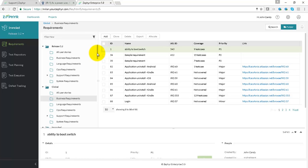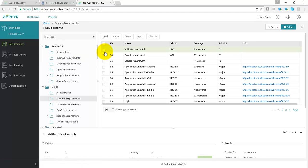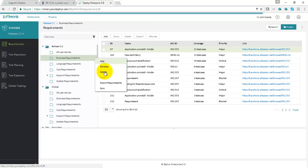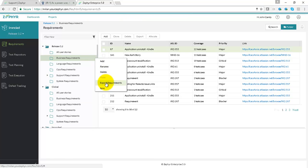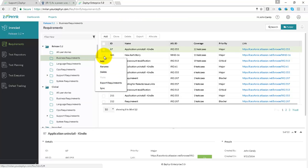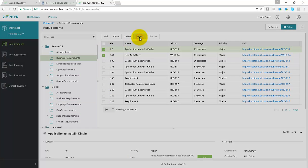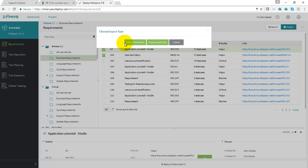You can also generate an entire traceability report. So if you select a folder or a bunch of requirements and either use the export option here, or by selecting a couple of requirements using the export option here, you'll be presented with two options to either produce an entire traceability report or a requirements only report.